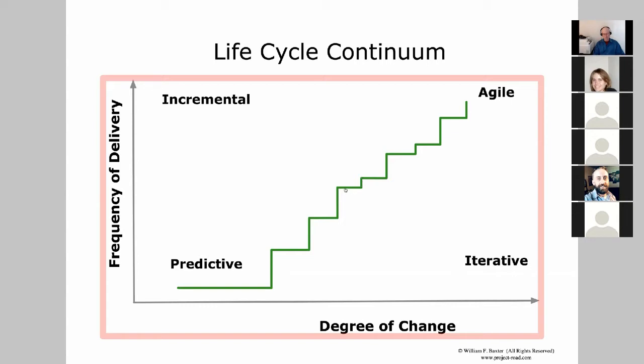So maybe what we built over this 2 weeks, the customer didn't like. That's okay. We only lost 2 weeks. We got feedback and we press on. So the idea is you're getting frequent feedback from the client, and you're delivering value along the way, and you're staying responsive to their changing requirements. And the requirements change for several reasons. First, especially with software development, it's really hard for the client to communicate what he needs until he starts seeing prototypes of the software.